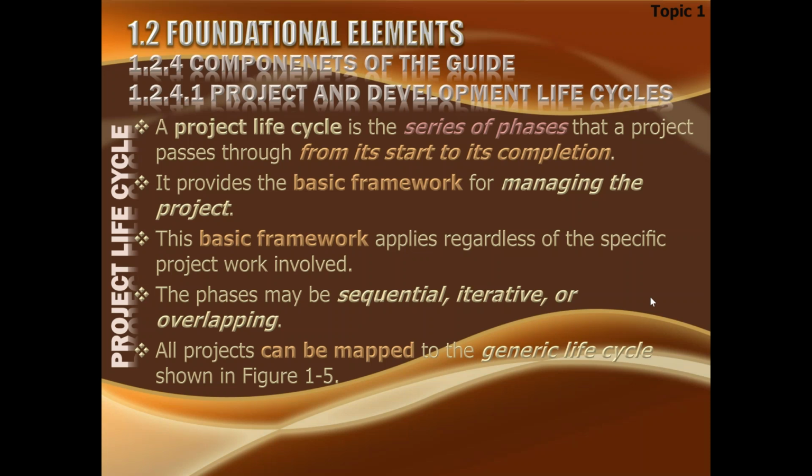Why am I advocating phase and sub-phase? Because the person managing the whole project needs to remember only the main phases. The person responsible for that phase will then be responsible for remembering those sub-phases and managing and planning for them. Therefore, this is doable. If as a project manager, I know I have got 5 phases and the first phase is this, second is this, third is this, you should be very clear that each phase is surgically separate from the other phase.